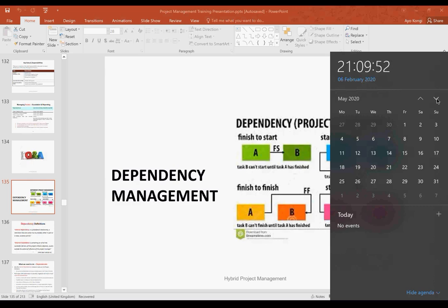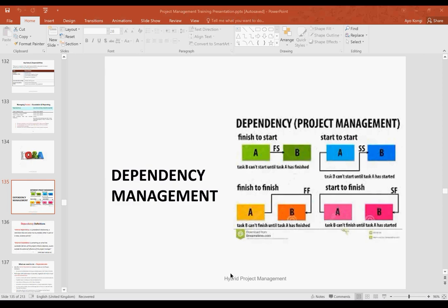We captured this as a risk earlier on. We said, okay, the risk, but unfortunately, we just have to manage it because we are dependent on them. It's an external dependency, so we need to work on that. There's a risk, and because of that, it has happened, and it is now an issue. Don't forget, they've moved the bank holiday without consulting anybody from the 4th to the 8th. We now have an issue to deal with because our vendor will not be working on that particular day. Does that make sense?